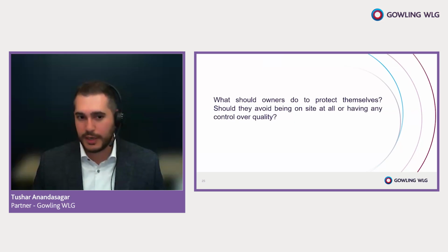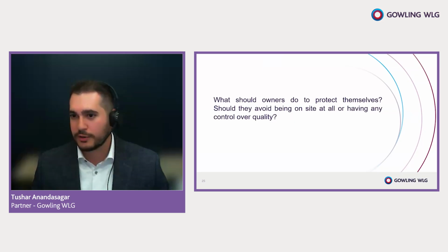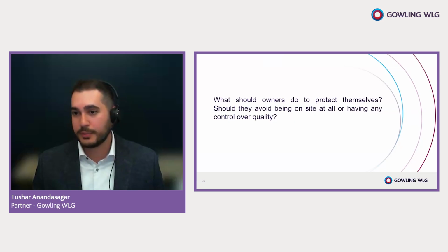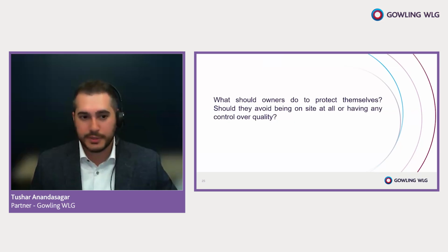So oversight is for compliance and contractual performance. It's not necessarily for managing daily safety unless there's something egregious that sticks out. And those egregious items need to be called out. So there might be a training point there for management and QC teams. We've got to document due diligence activities, including escalations. So let's say the QC employee finds an issue with the site. There is an escalation process under the contract. We are following the process. The GC is notified. The GC does something. We close the file. We've got to document those steps.